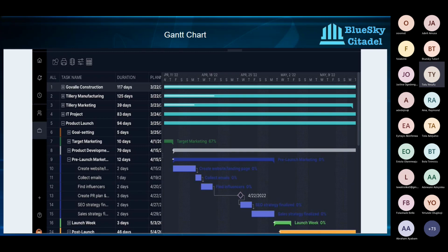Like the image I'm showing you right now, you have the project phases in there. The project phases show the development and testing stages of the product. You have the milestones in there as well. When you look at something like this, it's usually represented on a chart, on a template like this, using a diamond shape. That's where you have a milestone. You have your different tasks already highlighted on there as well.